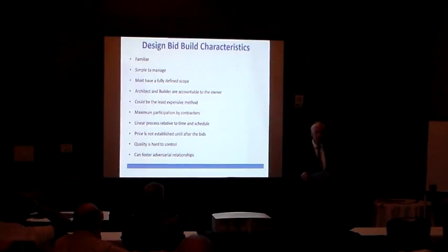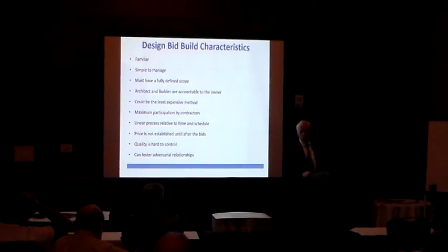Okay, let's talk about the characteristics of design bid build. And again, interrupt, throw out your comments, feel free to talk about it. An advantage of it is that it's familiar. One of the things we like about it as a contractor is that we pay attention to how our competition bids. We think we know how they bid, so if we see a job that we can go after, we'll go after it with a pretty good idea as to what we think our markup's going to be. And if we're low, we go to work. And if we're not low, we move on down the road.